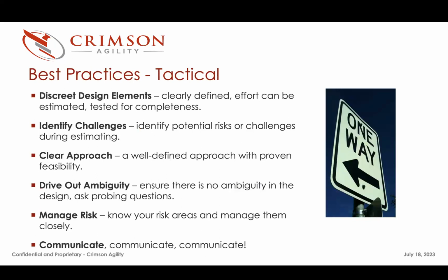Okay, so some of the best practices at a tactical level, make sure that you have discrete design elements. The statement of work is great. It provides a high level overview of the functionality that we're building or the work that we're doing. But during the design and planning process, try to be more specific. Try to ensure that they feel like they're on the same page with you. Make sure you walk them through that functionality. Outline a use case. Say, here's how a typical client will interact with this, and make sure we're not missing anything.